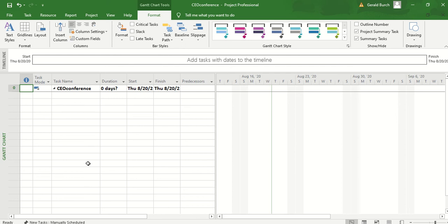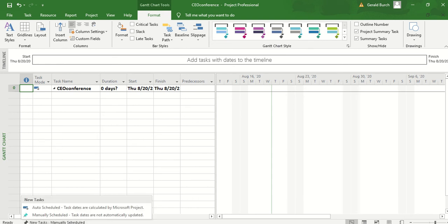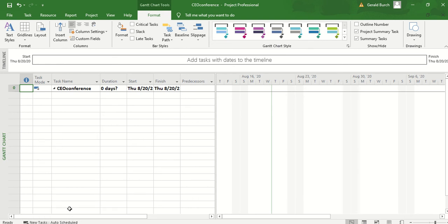You'll also notice in the bottom left hand side of your screen that it will say that it's a new task manual scheduled. You can left click on this. You can switch this to auto scheduling. Auto scheduling makes it to where it's going to schedule everything for one day. Let's go ahead and leave it for auto schedule right now so that we can play with that. Just know that that's an option for you to go back in there and work with over time.